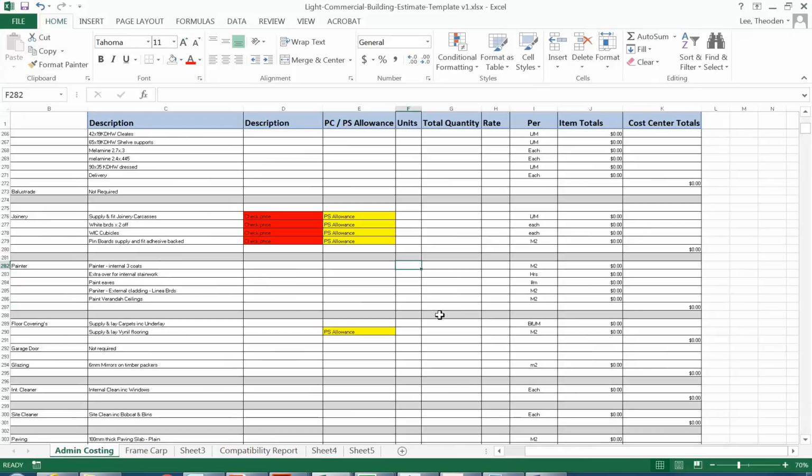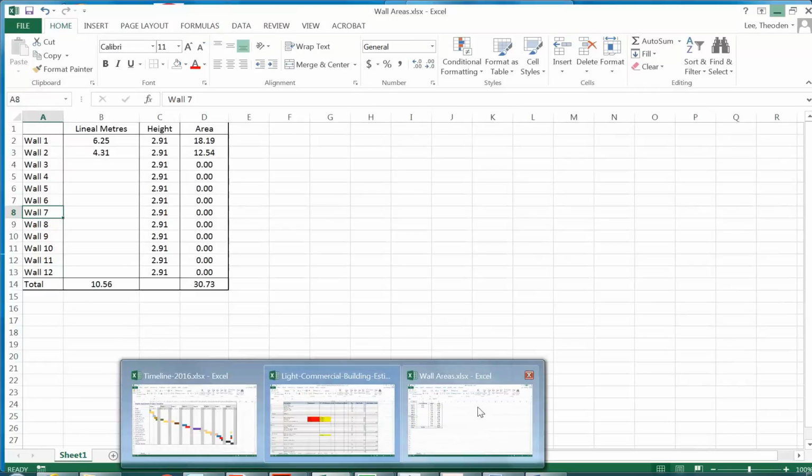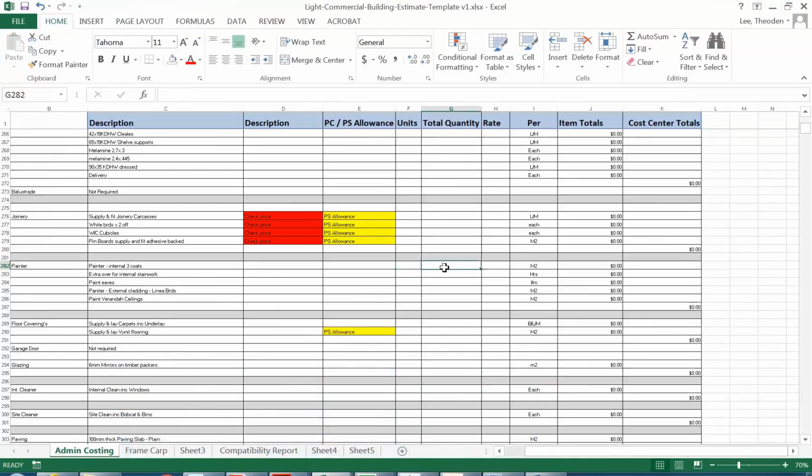And so then when using this table, as you put in, say, for example, the wall unit, so what did we have there again? So it may be, I don't know, 120 square metres in the end, probably a lot more than that, but let's just say 120. And then you put in the rate, so you need to work out a square metre rate for painting, so let's just say it's $30. And then you can see here, I have put some formulas in here, so this is a sum actually, but, well, it says sum, but it's actually multiplying those two cells there. And then you can see that this subtotal gets updated.